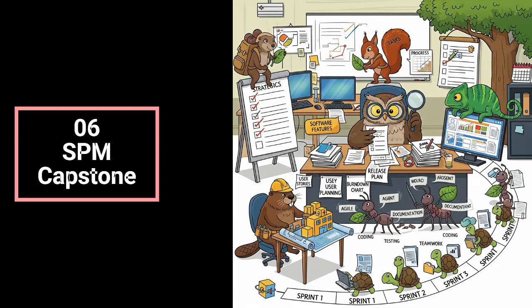Okay. And then a really key piece of info arrives in email from the dev team. What's in that? Their feedback on the requirements docs. And crucially, it includes size estimates for the user stories, using story points. Yep, story points, that relative measure of effort. And it also flags any task dependencies. You know, this thing needs to be done before that thing can start.